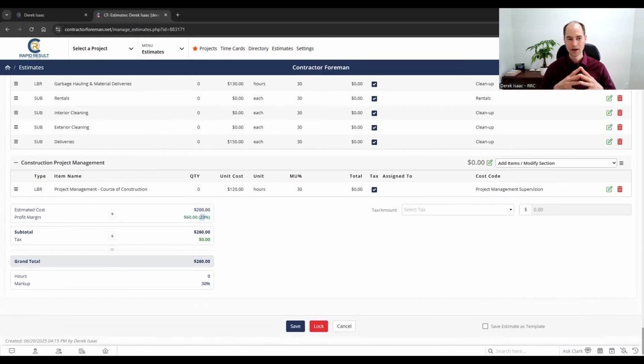So this is how, by not knowing your margins and your overhead, you can easily lose money on a project, because you might be saying, oh, 30% markup, I should be making bank, right? Like I should be easily making lots of money. Even if I've got my 15% overhead and 5% contingency, I'm making 10% on this project in profit. You're not, you're making 3%. And that's the difference between markup and margin.